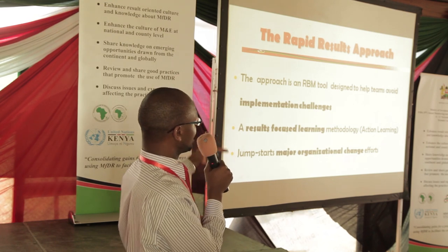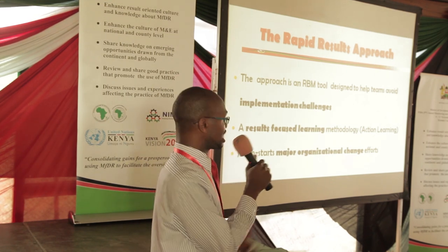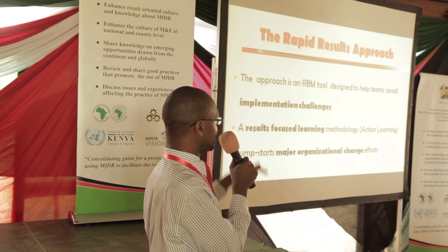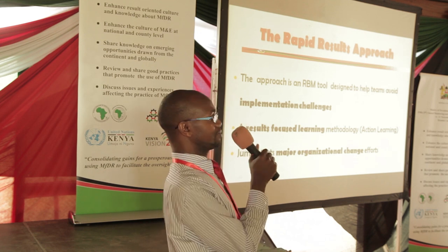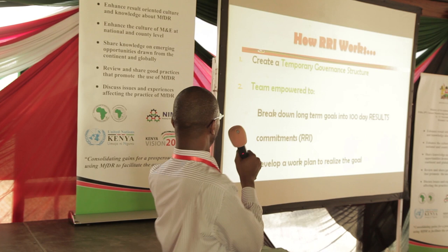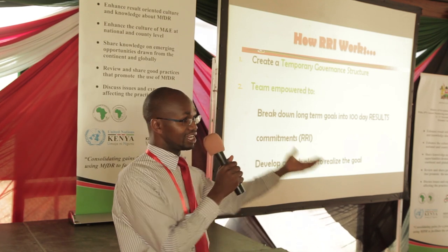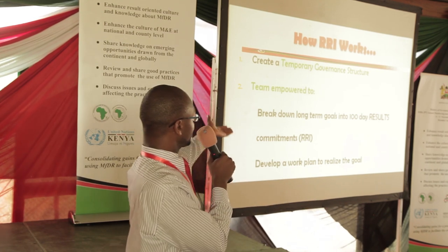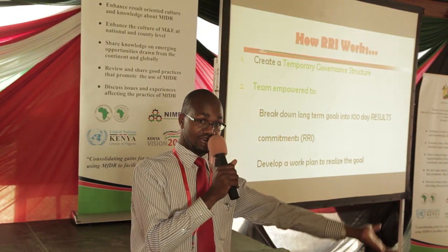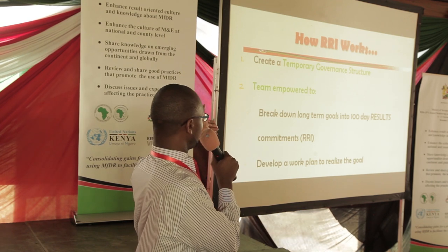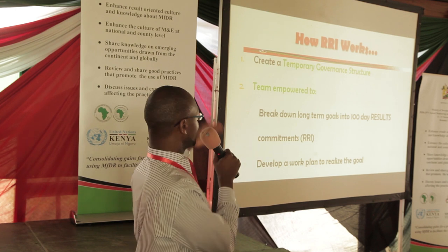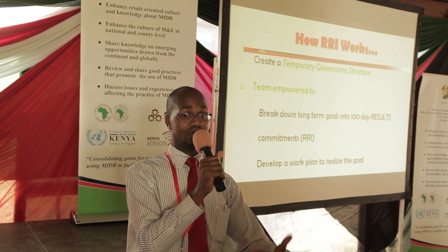A results-focused learning methodology. This RRI is an action learning methodology. What RRI does, it jumpstarts major organizational change efforts where everyone participates. How does it work? We normally create a temporary governance structure. We have a team empowered to break down long-term goals into 100 days. That's why we look at the annual work plans. And we break them down into 100 days resource commitments, which we call RRI, and develop our plan to realize the goal.